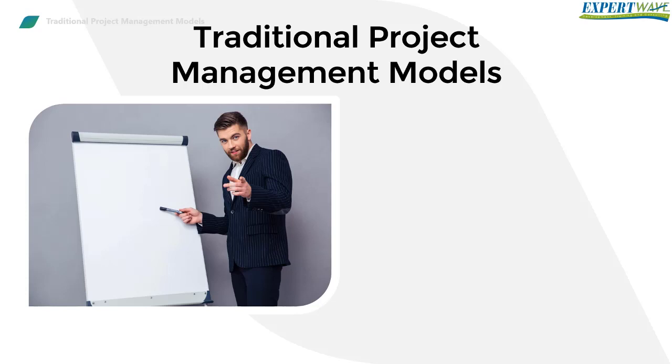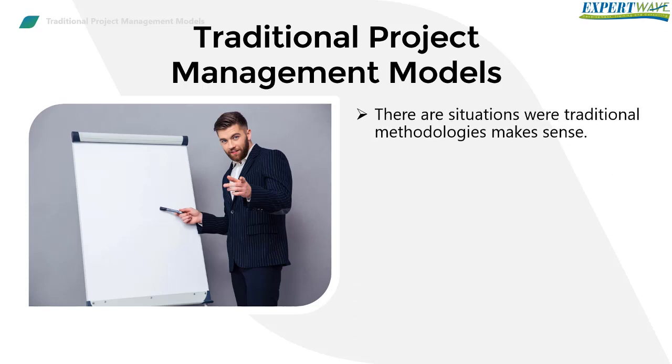Also, Magid has told me that he has worked with another company where the requirements were already defined in a separate project or phase. So, the software project was divided into two separate sub-projects. Sub-project 1, or A, was to define the requirements document, and sub-project 2, or B, was to build the software based on the requirements document defined in the previous sub-project. The requirements sub-project could be done using any model, including iterative ones, but the implementation sub-project would be easily done with pure traditional. So, again here, the requirements were 100% defined at the beginning of the project with complete details. My point here and the conclusion from this story is that there are situations where the traditional methodologies just make sense. Yes, those situations are usually rare in the software industry, but they exist.